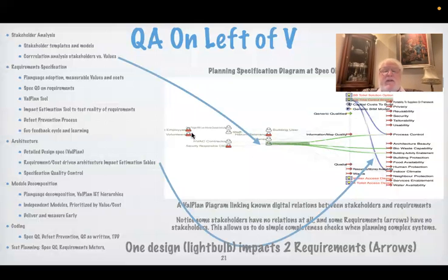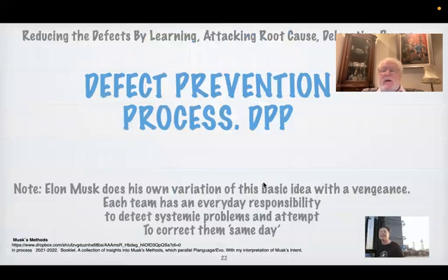But I can also see that this stakeholder, called volunteers, is not related to any requirements. And the very definition of a stakeholder is that they are related to some requirements, otherwise they shouldn't be there. So we now can detect that there are missing requirements for the volunteers. They could be here, but nobody's attached them and said that the volunteers are interested in the usability requirement, for example. That needs to be put into the digital model, okay?